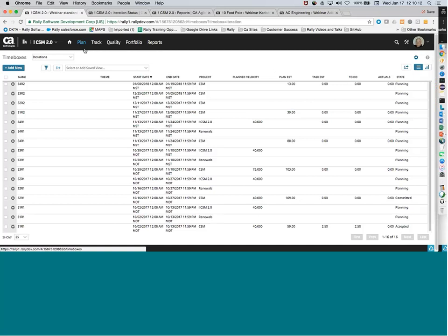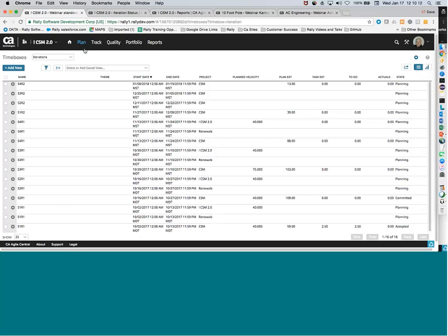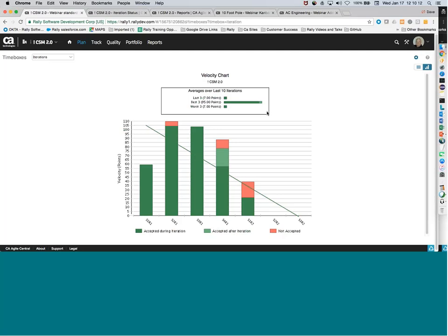All right. Another useful chart or graph is the cumulative flow diagram. And what this is going to show you is essentially the states that your work will have to pass through and the relative numbers of work items that are in those particular states. So it's a graphical depiction of the work in progress. And it's really going to give you the ability to understand where are bottlenecks and where are potential problems in my process.